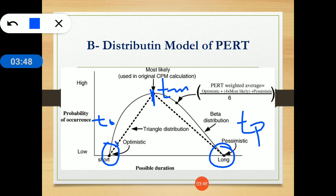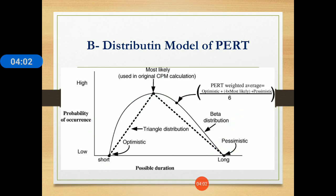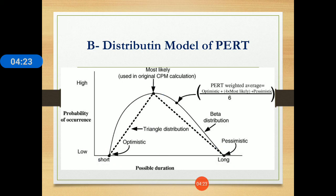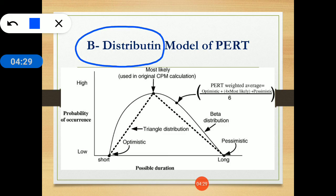In PERT, three times are always given: optimistic time TO, most likely time TM, and pessimistic time TP. Optimistic time is the shortest time for the activity. Pessimistic time is the longest time for that particular activity, and most likely time is the average time for that activity. The time estimates in PERT follow the beta distribution.